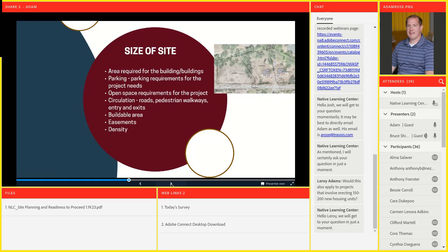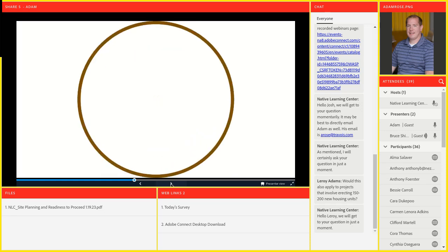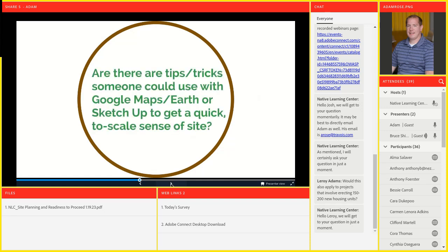So that means you don't have to go to the planning commission. You don't have to go to the city council for approval. You can short circuit a lot of that time. So several lengthy and costly hearings don't have to occur. You still have to meet the zoning requirements, but you don't have to have that discretionary approval.